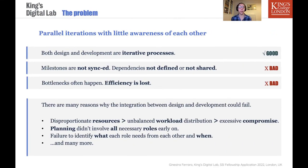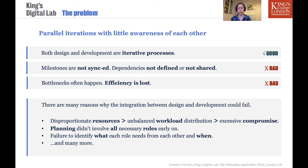The problem I see is that we have two iterative processes developed in parallel with little awareness of each other, which could lead to milestones not being synced and dependencies not defined or shared. This could cause bottlenecks and frustrations for the people working on the project, meaning efficiency is lost. The reasons why design and development are not well integrated could vary — disproportionate resources between teams resulting in unbalanced workload, or during planning not all necessary roles were involved, generating conflicts about dependencies not being identified early.